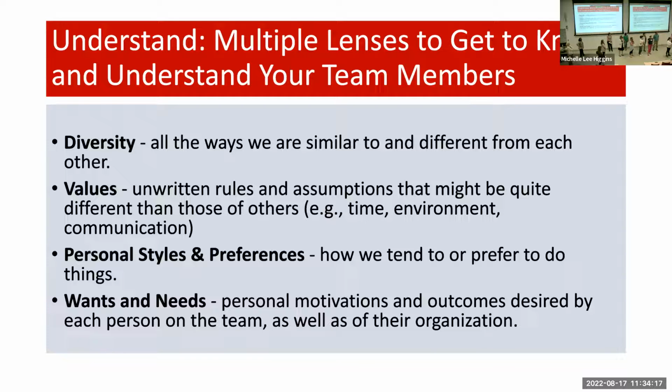I also just wanted to say, because my role really often is to wrangle very large teams, I think that setting expectations from the beginning matters. It's not just my personal preference that I want people to hit deadlines. I always use this analogy, it's the domino effect. If you don't hit your deadline, it's going to domino all the way down to the various timelines and benchmarks we have to get the project or the grant submitted on time. So I set those expectations very clearly from my very first meeting with potential collaborators and people who will be involved with getting pieces of the grant together, because no one likes to see those dominoes start falling. Thank you, Riley. And you'll see some of that in the plan section.